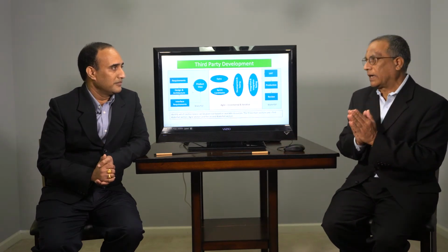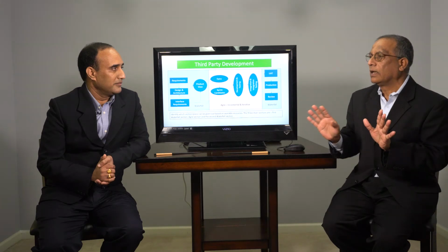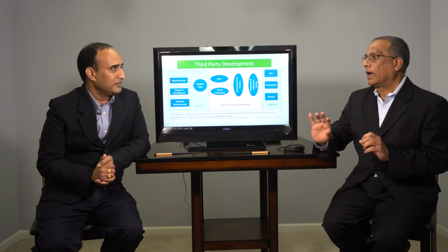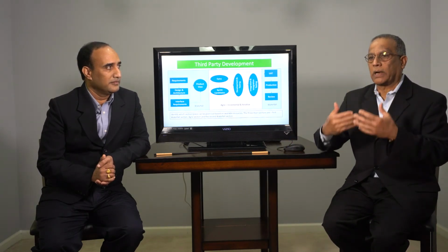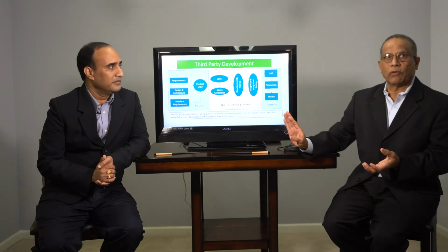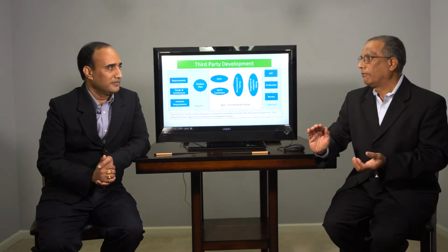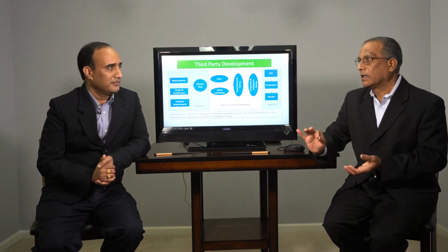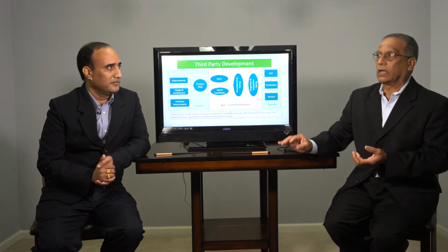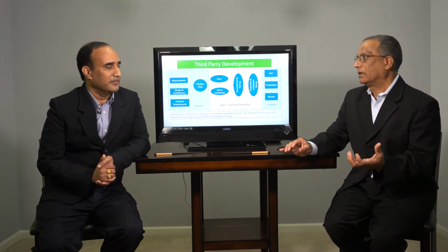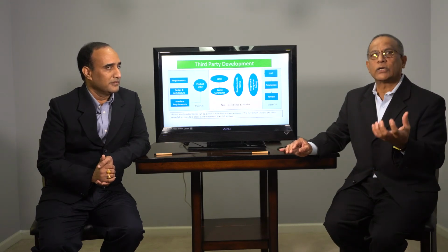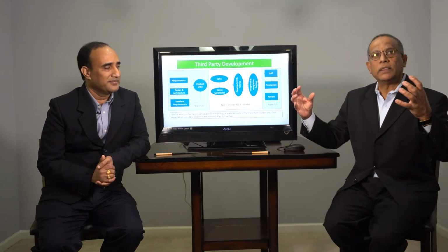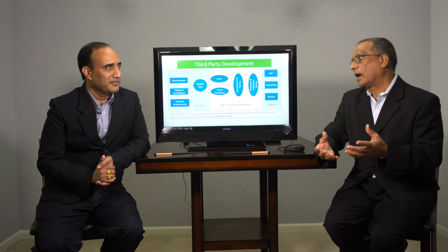But here the most important thing is, when you are giving it to someone else, you need to define the handoff requirements. That's very important here. So you should have some kind of expectation when you are giving it to someone else. What are you going to get from them? That has to be clearly documented. At the same time, the second party or third party should have the same expectation. What is it that they're looking for to do their job? That has to be clearly defined. So when these two are matched, automatically you're going to see good success there.